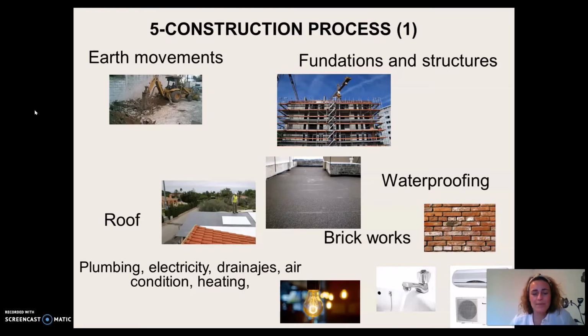The first step is to move the earth. Digging and excavation works are the first step. With these works, we can get the levels of the basement, main floor and first floor, and we need to paint or mark on the ground the levels of the final house. After earth movements, foundations and structures start.